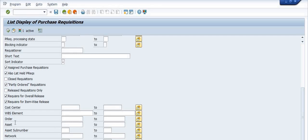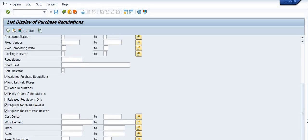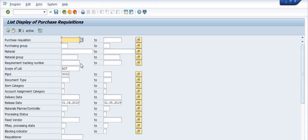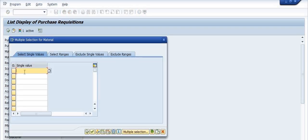These are account assignment options. For WBS elements, if you have released an external processing activity or network activity in release mode, a background purchase requisition will be generated, and that purchase requisition will be used in the creation of the purchase order. For example, I am now filling in a material code to find the purchase requisition data for specific materials.